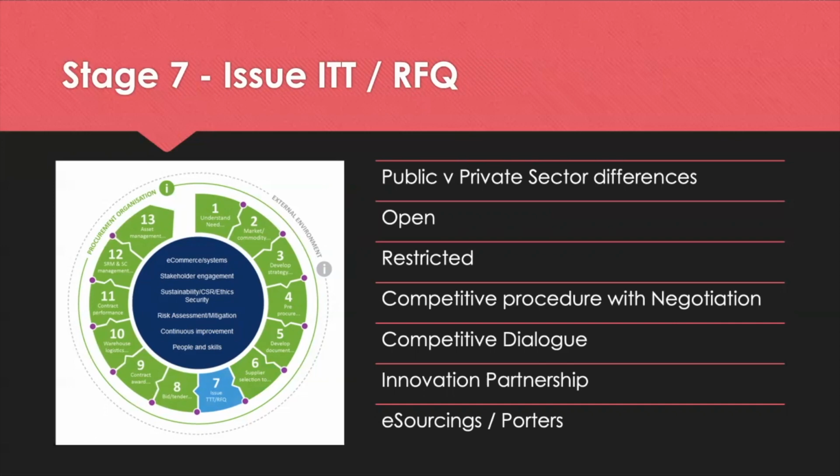It should be noted that these documents would include the standard terms and conditions, because what you want is suppliers to come back and say whether or not they want to qualify or change anything that you've asked them to do. They might say, actually, term number 3 is not really something that I can agree to. Could you overlook that? And that's a decision you can make during the live tender or quote period.